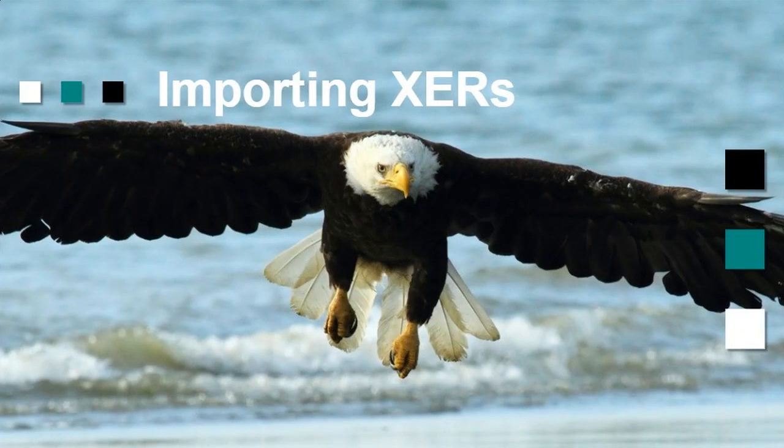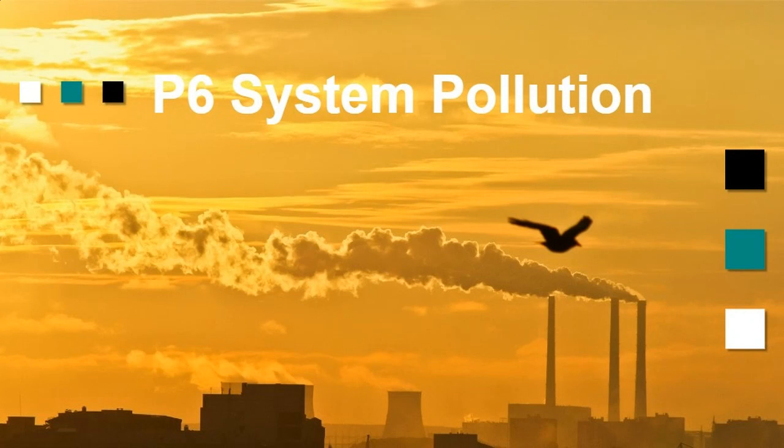Now, we all know from having to struggle with it that XERs have global data. They contain things that we may not want in our system. So they end up often polluting your P6, which becomes difficult when you want to have consistent reporting and you want to make sure that your program is being managed consistently.